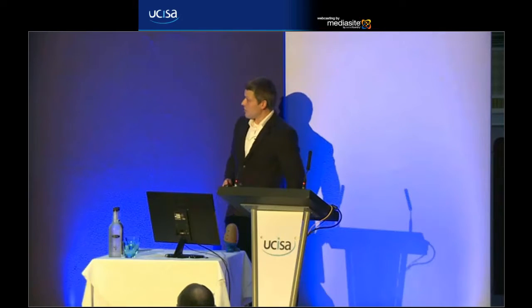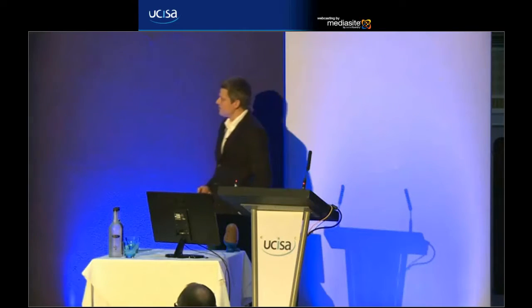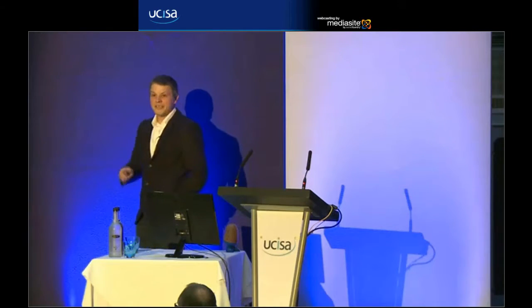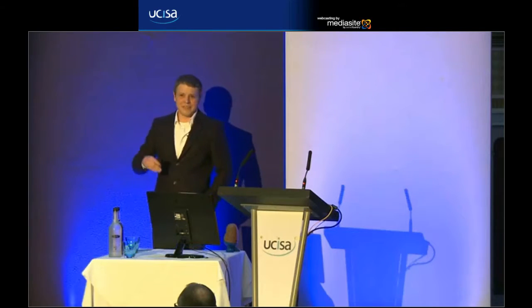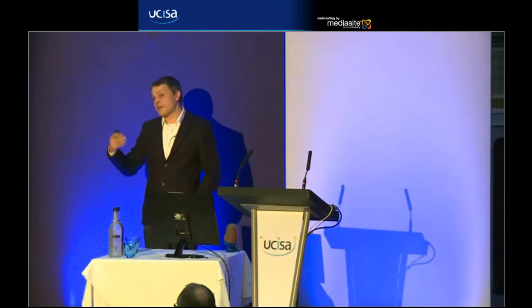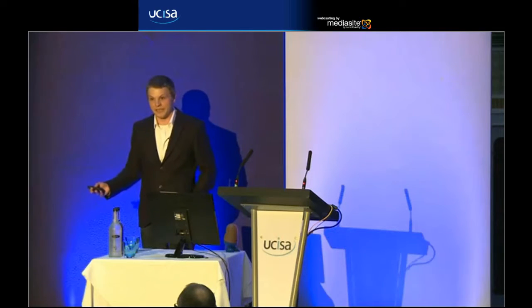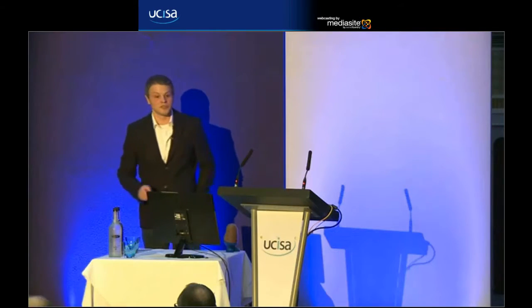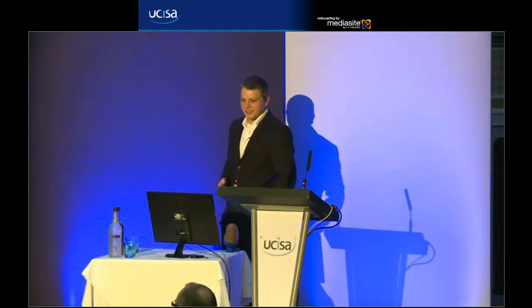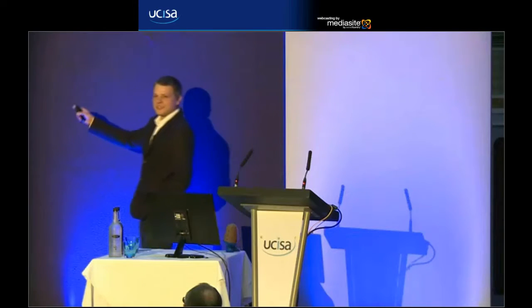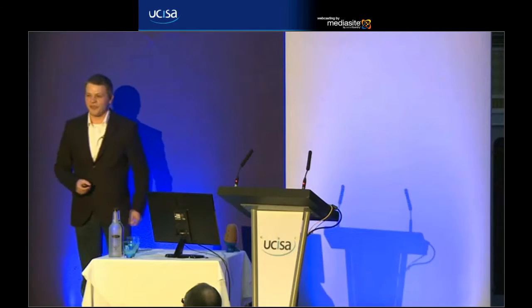There are some additional cards along with these ones. These are the numbers that you've just seen. We've got some special cards as well, a 0, so that when we're doing estimation, if we think it's really tiny, if we think this is too small to even give a 1, we can use the 0 card. We have an infinity one. This is really used when it's either so huge that we don't know what to do with it, or we haven't got enough information, really. We're saying, well, it could be anything, effectively, because we don't have enough to be able to size this one, to estimate the size for it. Pop in a half for good measure. And very important, if you're doing Agile estimation all day, then quite often somebody will want to play the coffee card so that we can have a break.